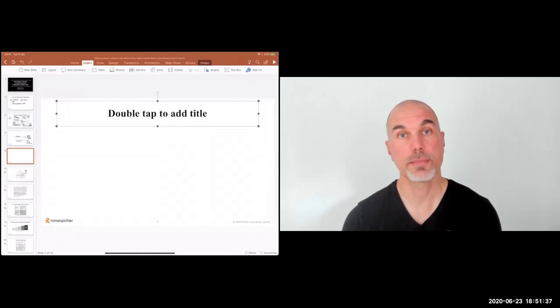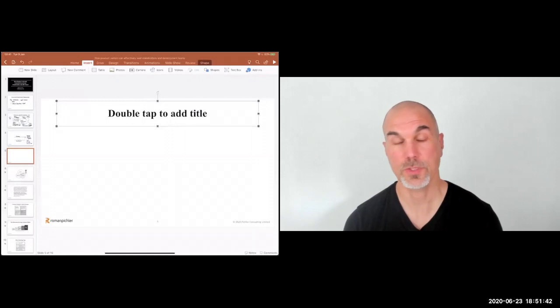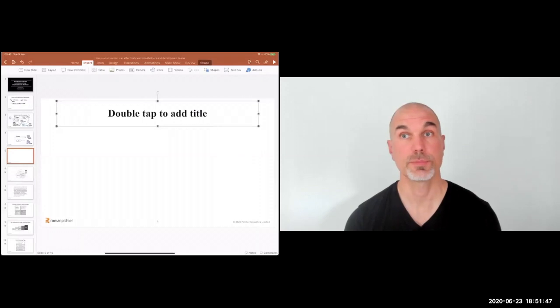Particularly, mix and match what's referred to as qualitative and quantitative techniques. A product demo is a qualitative validation technique — it helps us understand why people would like to interact with the product, why they think it looks usable. But it's limited to a fairly small group of people, and there's a risk that the feedback isn't representative for the whole market or target group.